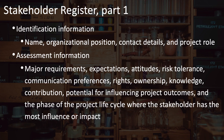Stakeholders may also have ownership — a person or group may have actual legal title to an asset or piece of property that is related to, needed by, or affected by the project. Different stakeholders will have different knowledge that can be useful for the project — specialist knowledge that can benefit the project, as well as knowledge of the different politics and power structures within the organization. Any stakeholders that are experts in a certain field that may be of use to the project are people you should consult when seeking expert judgment on the project, and this is a good place to record that information.